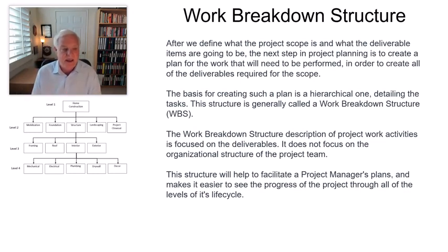And then finally, if you take that interior and you continue down from the interior into the plumbing, you can see that on level 4 we have mechanical, electrical, plumbing, drywall, decor. All of that must happen. And all of that filters up. So you can see how that builds itself up. The WBS structure is that hierarchical structure that walks the plan level by level, task by task with subtasks.